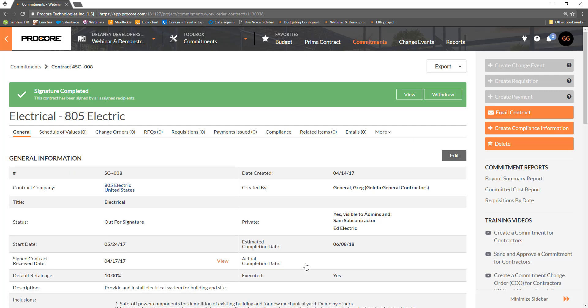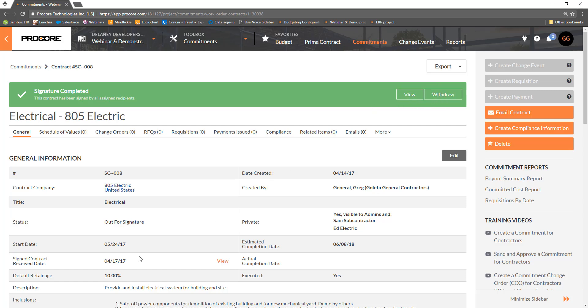Back in Procore, now that the DocuSign workflow is complete, the banner at the top of the commitment shows the document has been executed and finalized. You can void the DocuSign document by clicking Withdraw. The signed contract receive date shows the date the DocuSign workflow was completed.